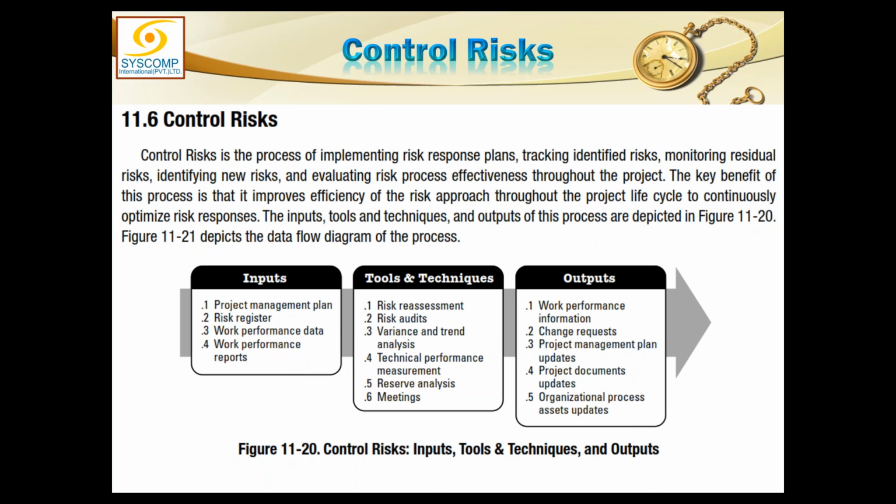So we will keep an eye on the circumstances and the environment which could indicate that a certain risk is just about to happen. So if we catch anything like that out of the identified risks, we will immediately take action and invoke the risk response plan.